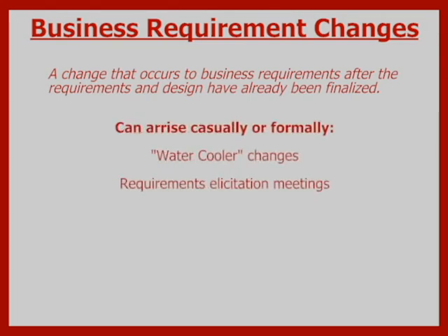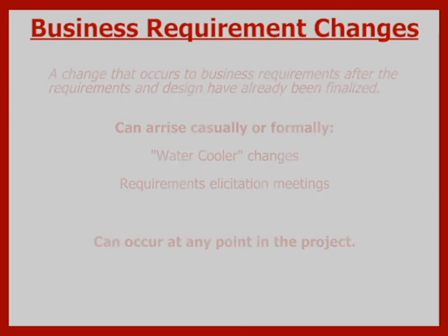They can happen as casually as around the water cooler, "Hey, do you know what would be cool?" from the boss, or formally such as through a requirements elicitation meeting. This isn't restricted to new features, unfortunately, so these business requirements changes can occur at any stage of software development. These changes can therefore be expensive and can delay any project.